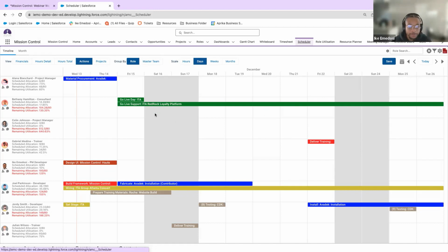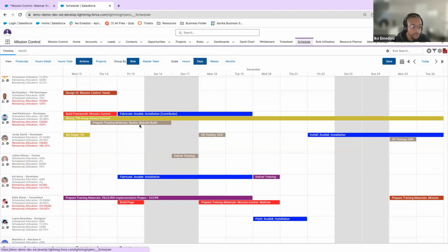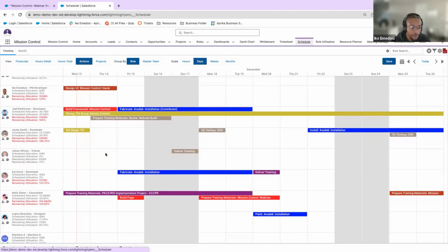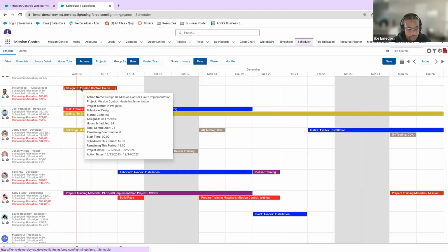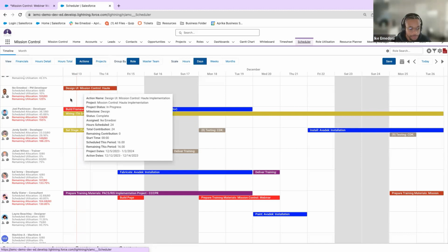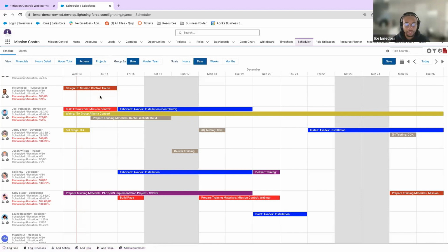So real quickly here, we're seeing some crazy nice numbers. And it's automatically showing me that Alana has a lot of work to do in terms of resourcing. As Alana, I'm looking at everybody's schedule. I can see that, for example, Ike Mendoza, and look at these 2 metrics, the schedule allocation and schedule utilization, is looking at this 2-week span. With 40-hour work weeks, it's going to be 80 hours. So in this 2-week span, Ike Mendoza has 1 job, and it's taking 8 hours of his work to complete this job.